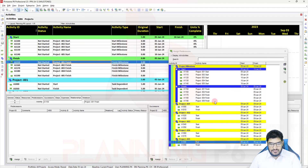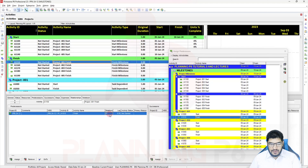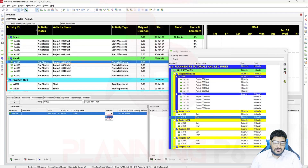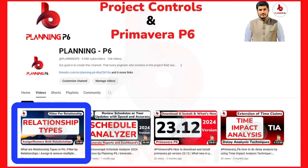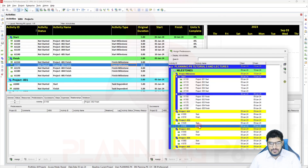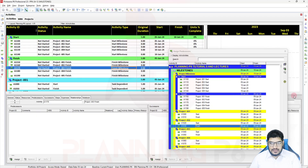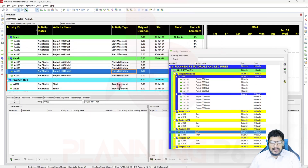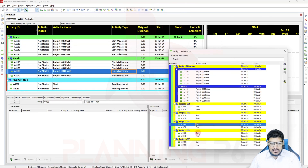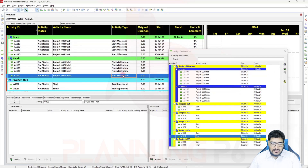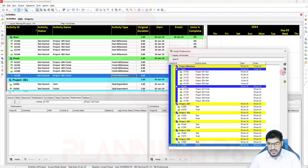Now for the finish milestone, I will open the same window and assign the predecessor with a Finish-to-Finish relationship. You have the option of Start-to-Finish or Finish-to-Finish. You can see our tutorial on relationship types — we have uploaded it and it explains very well how you can use them. The finish milestone will automatically take Finish-to-Finish unless another relationship has been assigned.